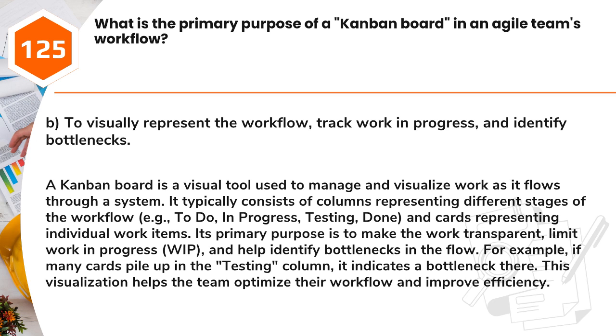For example, if many cards pile up in the testing column, it indicates a bottleneck there. This visualization helps the team optimize their workflow and improve efficiency.